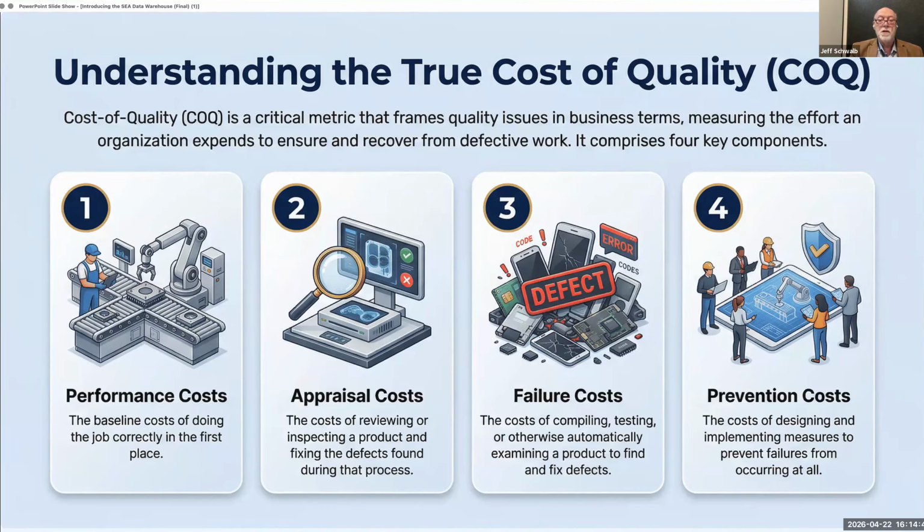This is appraisal and failure, and often looking at relationships between those basic measurements and putting ratios together gives us insight into how much performance is affected. Performance is the overall time doing all of the work, but looking at these subsets of that data gives us that cost of quality insight. Plus, when we see things like appraisal time goes up, therefore failure time goes down, performance total time actually reduces also. So we're putting out higher quality products with less time.